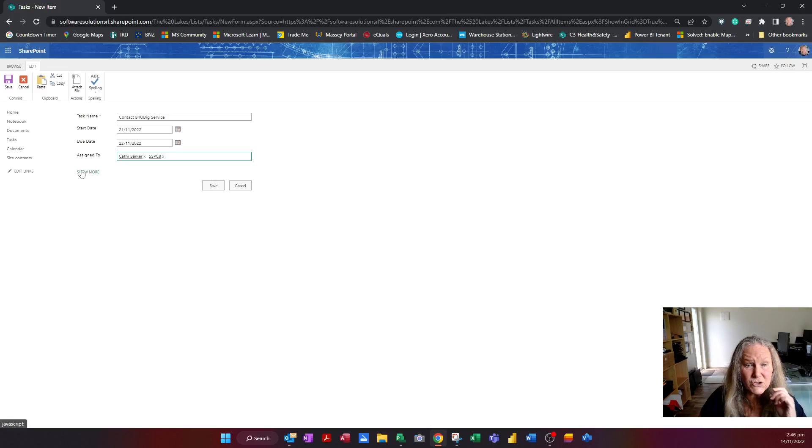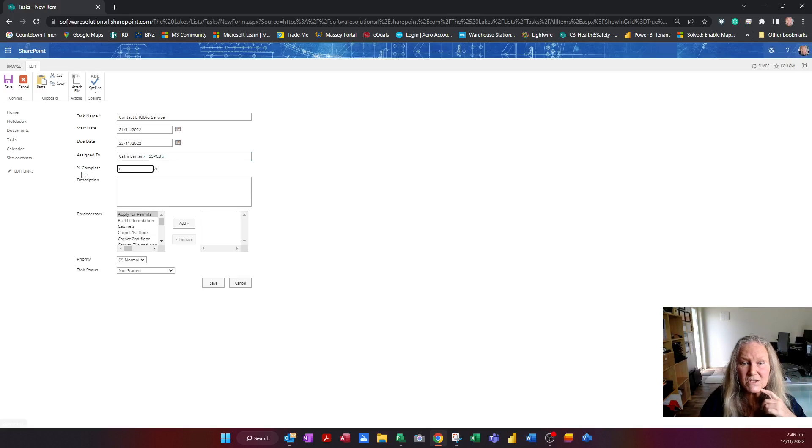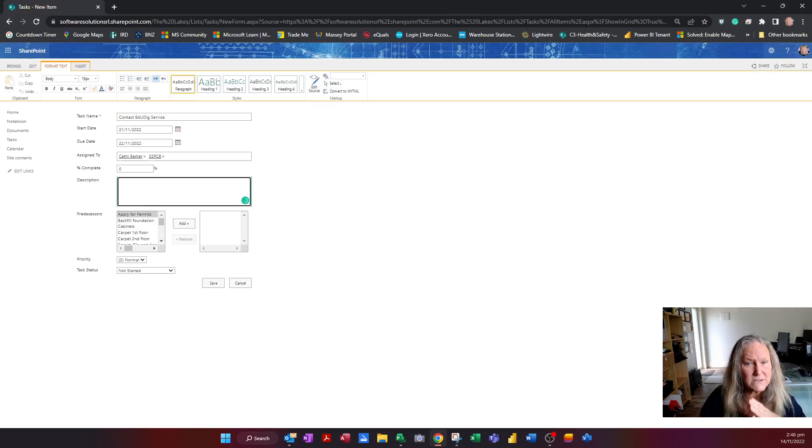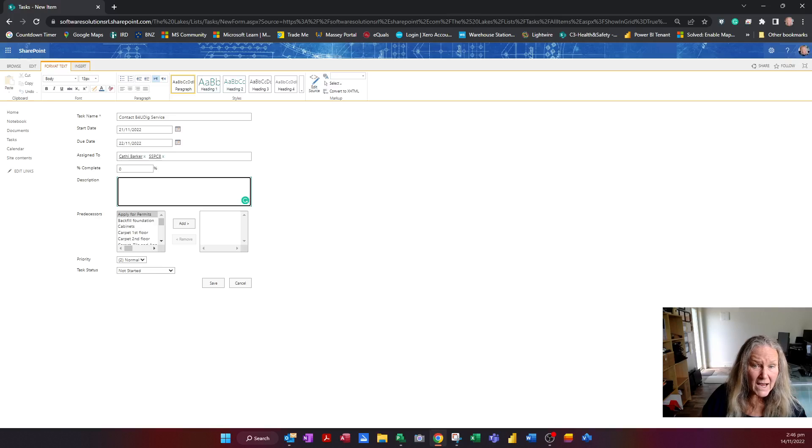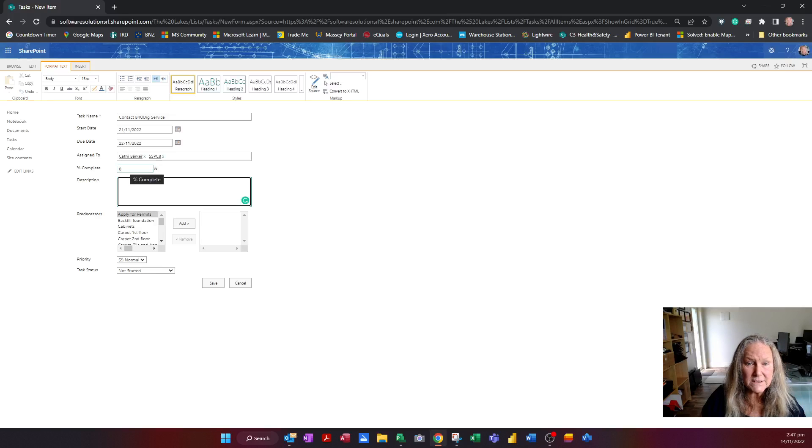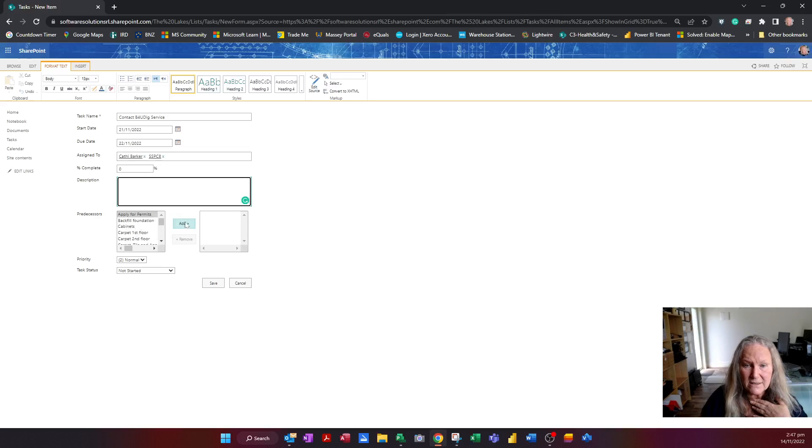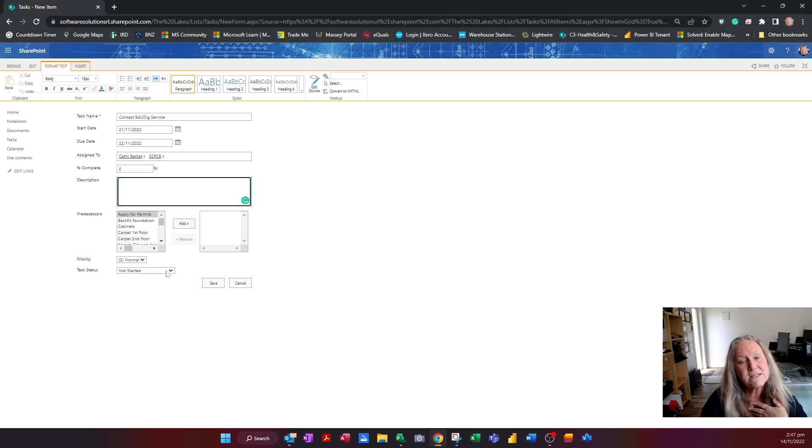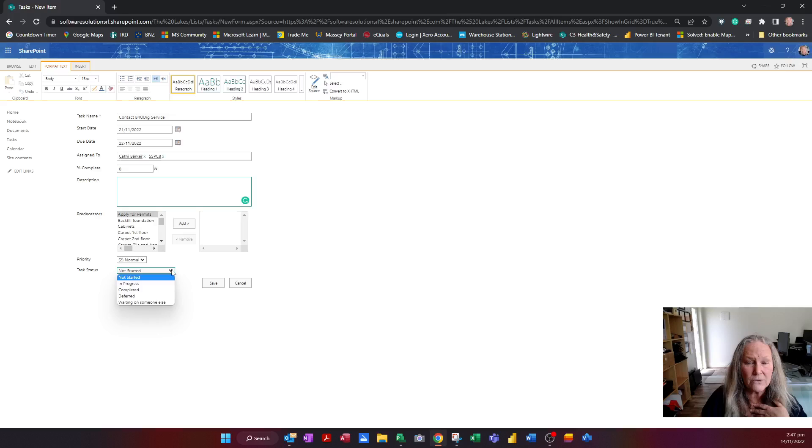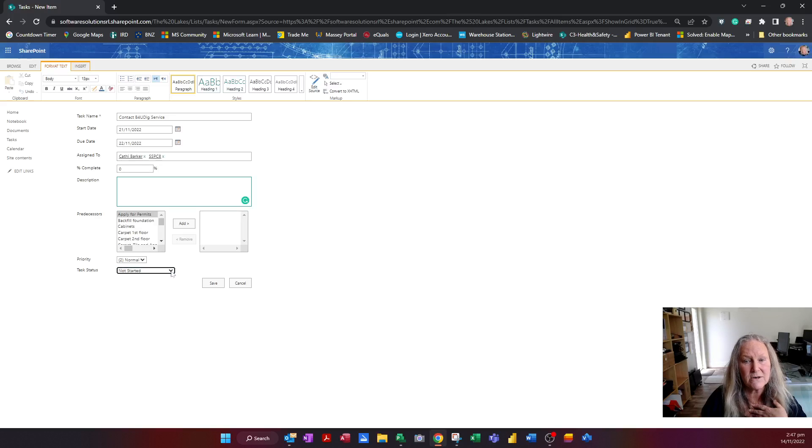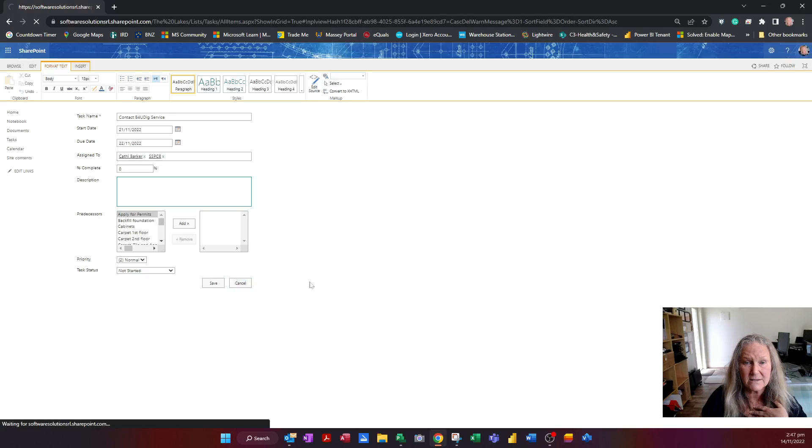And I can show more information if I want to, such as give it a description. If it's already partially happening, I can even say what percentage complete it is. I can then add a predecessor just by choosing it and hitting add, give it a priority and say whether the task is actually in progress, completed, etc. But I'm just going to save the task.